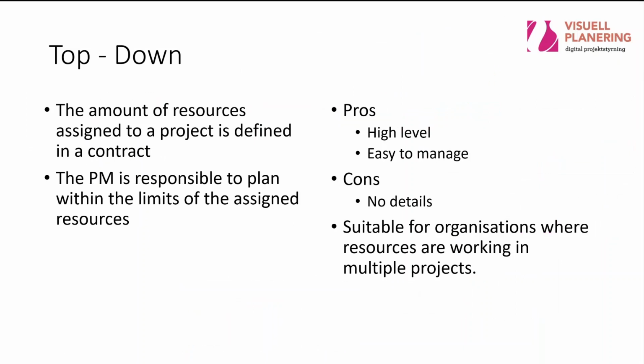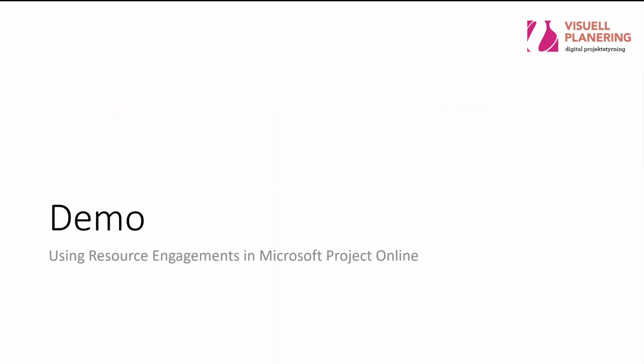So the major advantage here is that it's high level. It's a lot less data to manage, which makes it easier to succeed with. The disadvantage is, well, you can't drill down, and if you're running a project with only full-time resources, then this will just be extra work for you. But for most organizations where resources are working in multiple projects, this is the most efficient way of working, I would say. So now let's see what it looks like in a short demo.